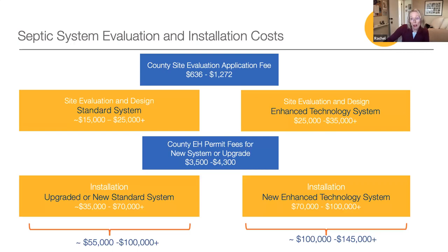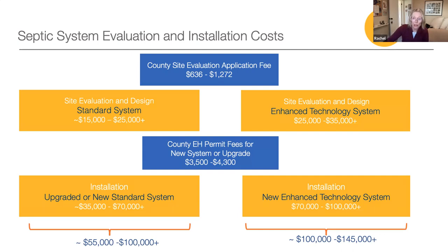So what will the new system cost? There are three kinds of costs associated with these systems: application and permit costs, evaluation and design costs, and the cost of installing the new system. There are complex factors that influence these prices, so we can only offer a range. Environmental health service fees for the site evaluation are between $600 and $1,300, while the septic system permit itself can run between $3,500 and $4,300. In total, environmental health service fees can cost between $4,000 and $6,000 generally speaking.